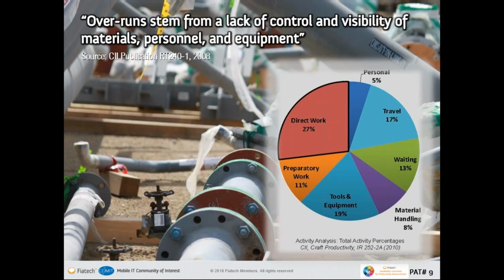So if you look at other places they spend their day, pretty inefficient, or they're around planning. But in most cases, there are some easy low-hanging fruit items that they could really improve on. So one of those, just to mention here, would be waiting. So if you look at the waiting time, 13% of their day is spent waiting, and waiting is around waiting for their work instructions, waiting for their materials, maybe because they can't complete their installation package without those materials, and the same goes for equipment as well.